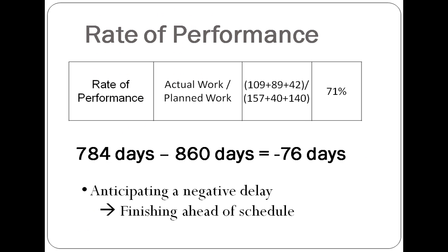The rate of performance based on completed tasks can be calculated by dividing the duration of actual work by the planned work. Because all three initial subtasks were dependent on completion of the previous, they are all on the critical path. The actual durations of the first three completed subtasks are summed and divided by the sum of planned durations by PERT. Specifically, this would be the sum of 109, 89, and 42, divided by the sum of 147, 40, and 140. The result is multiplied by 100, and our rate of performance is thus 71%.